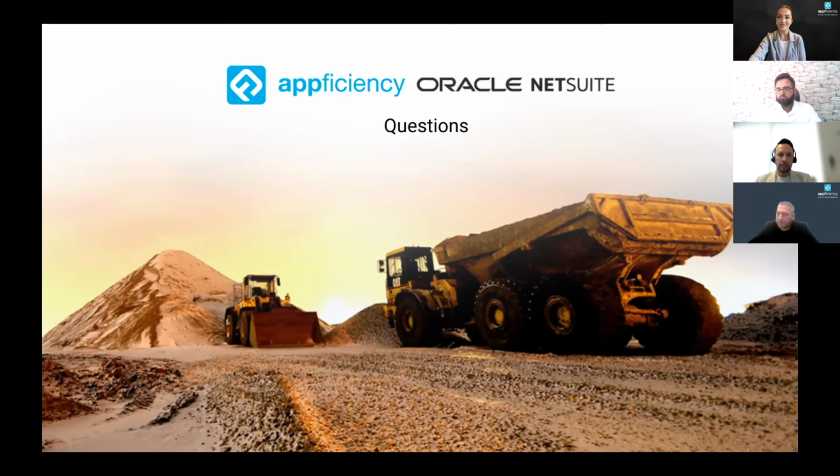Sure, thank you. This is related mainly to when you have a fixed price contract. If you think about the progress of the project, in order to do the actual work and make some progress, you need to receive some of the materials on site. And this simply needs to be calculated towards the percent completion of the project, because that would provide a weight against the percent completion.